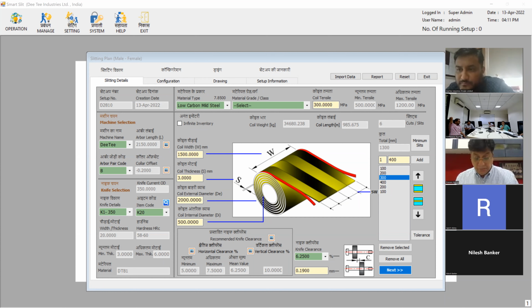What I personally feel, sir, is that this quantity might have come from another perspective: they already have some splitting line working in that plant, and they must not have sufficient spare tooling. This project being a capex item which could have been sanctioned, they must have added the spares required, so that they can work for both the lines and no need to order spares for that line. Okay, so that can then be correctly optimized in our program. Though we supply 1,000 numbers total quantity, for this project only 600 would be used.